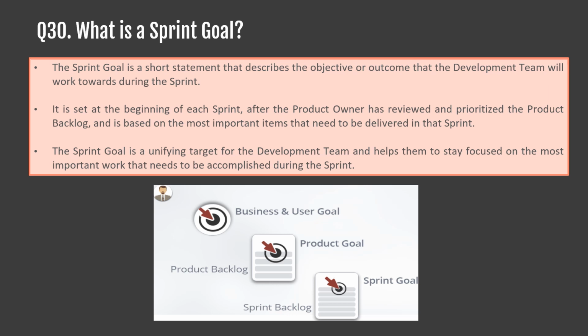The increment delivered at the end of Sprint 2 might include the ordering feature, any associated user interface updates, and any necessary integrations with other systems or services, for example, payment processing or inventory management. The ordering feature increment should be thoroughly verified to ensure that it works with all prior increments, such as the browse feature from Sprint 1, and is usable by customers as defined by the definition of done.